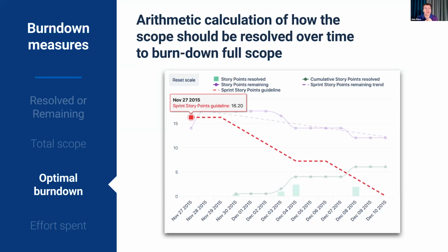And this calculation uses the MDX functions of processing dates and durations. In this particular case, you can see the steps in the line, which is because the durations behind the measure are calculated in the work days. And it shows that no progress is needed during the non-working days, which is fine.